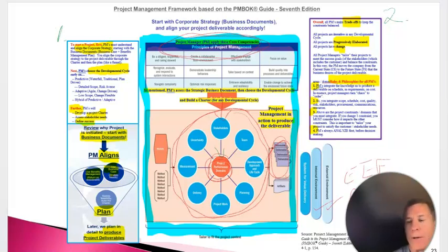But here is a project that by normal standards is a massive failure. It was budgeted at about $2.5 billion. It ended up costing over $14 billion in the end. Fortunately, it was taxpayer money, or it probably would have been shut down. It was supposed to last a few years, and in the end took over a decade, right? It had some risks that weren't assessed, which led to some failures. But today, you can't imagine Boston without it, right?